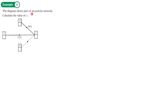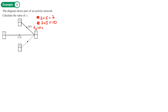Example 5: the diagram shows part of an activity network — calculate the value of x. We're calculating an early event time, so that's a forward pass, meaning we find the highest value. Route one: 2 plus 5 gives 7. Route two: 7 plus 3 gives 10. Route three: via the dummy, which has no time, gives 9. Forward high — we take the highest value, so x equals 10.